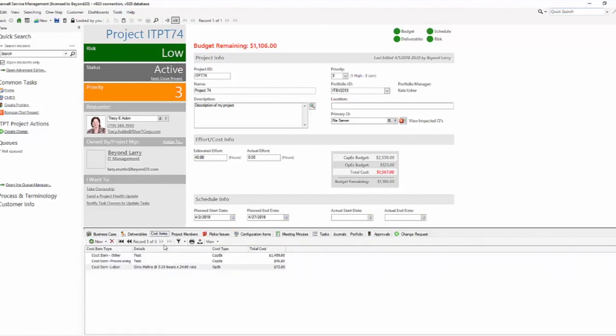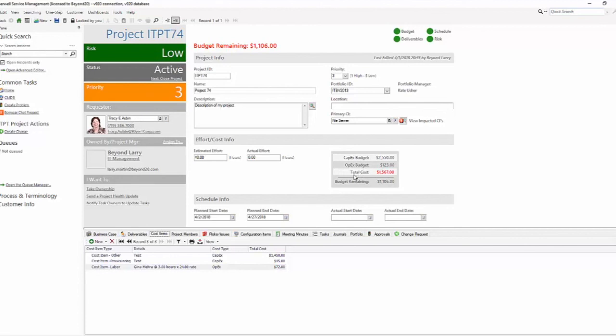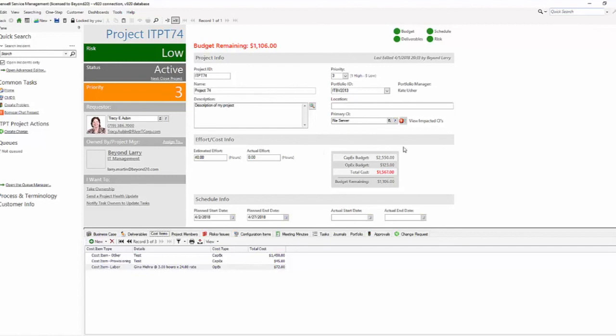You can toy with these and change them up as needed to meet your specific requirements. Our cost items, where we can track our budget. I recommend making sure that cost type is visible. I also recommend potentially adding your capital budget, capital expenses, and then operating budget, operational expenses, and then project expenses and project budget remaining. That way you can see per budget type or cost type what has been spent under your capital, what has been spent under your operational, and then you can see what you've got left in each rather than just a general here's my project budget and then having to come in here and start looking for things.